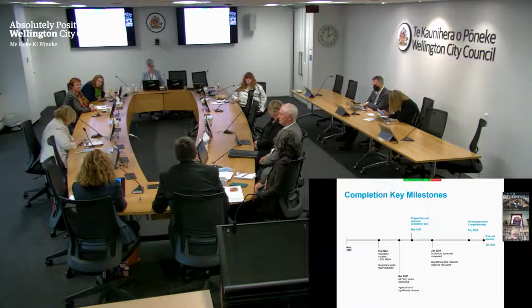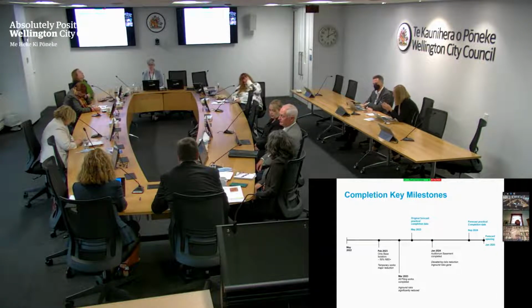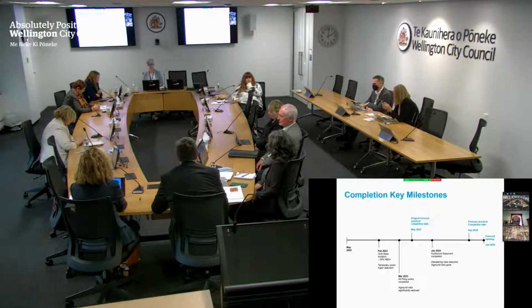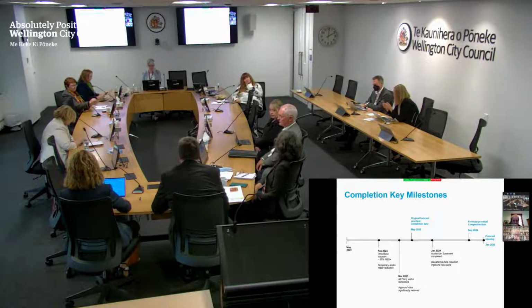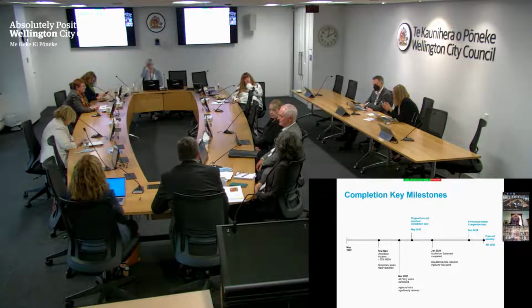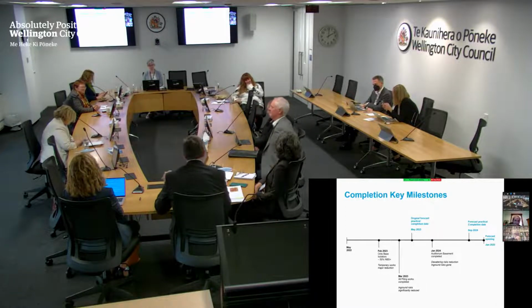So they're not disappearing, and we still have the unknown risks around, will COVID do anything? Will it continue? Will it accelerate? What's happening in the market in terms of cost escalation, what's happening to the supply chain, and what's happening to other people in the market. So a good example here is that at Takina, the supplier of the operable walls has gone into liquidation. So we're quite lucky that the operable walls had arrived, but it's by the grace of God, these sorts of things, to be honest.